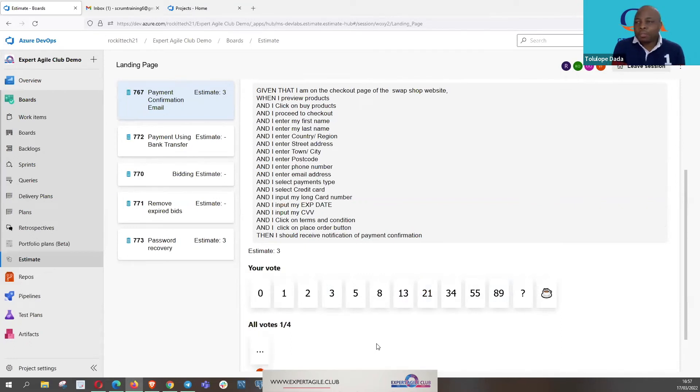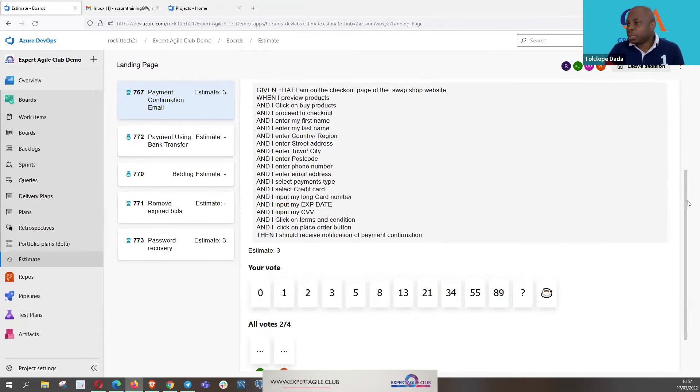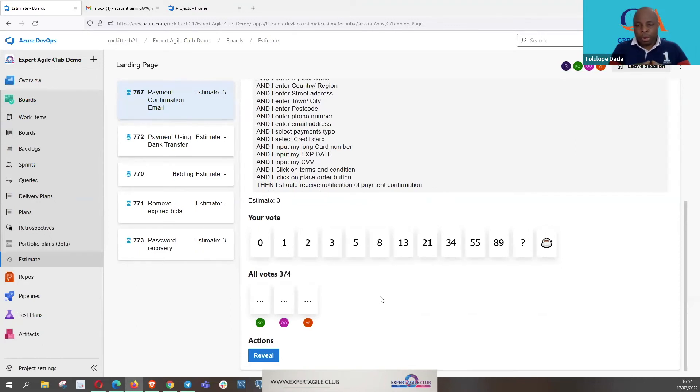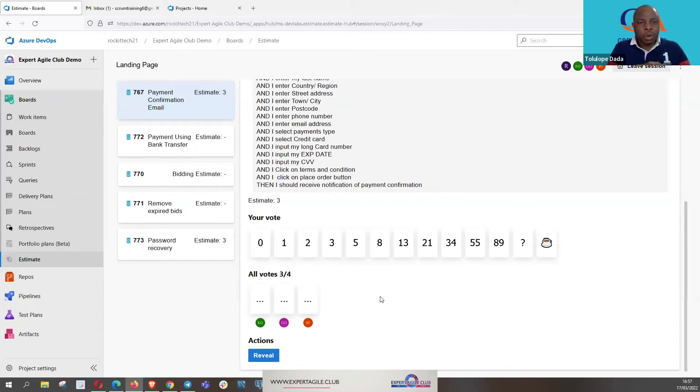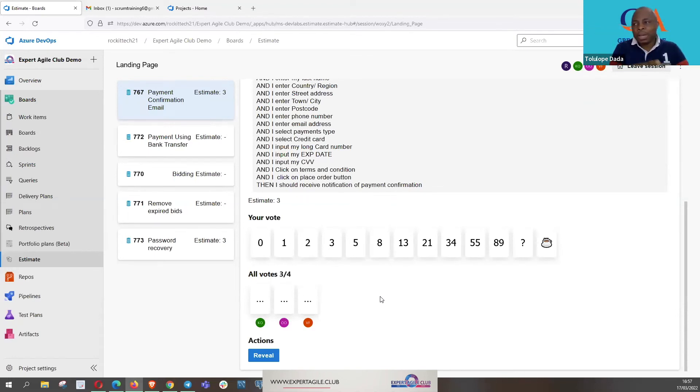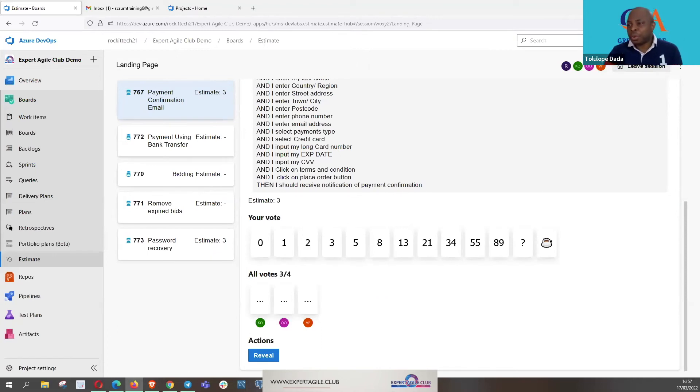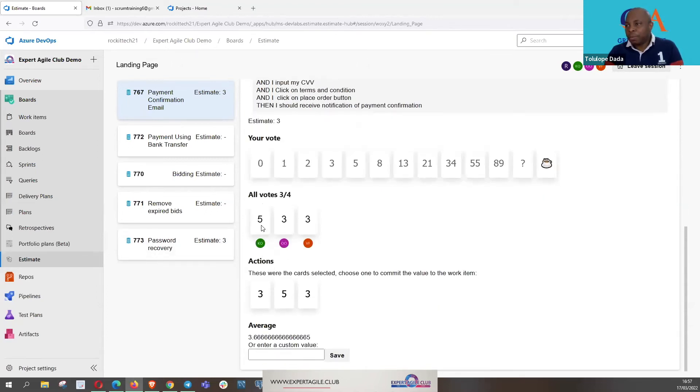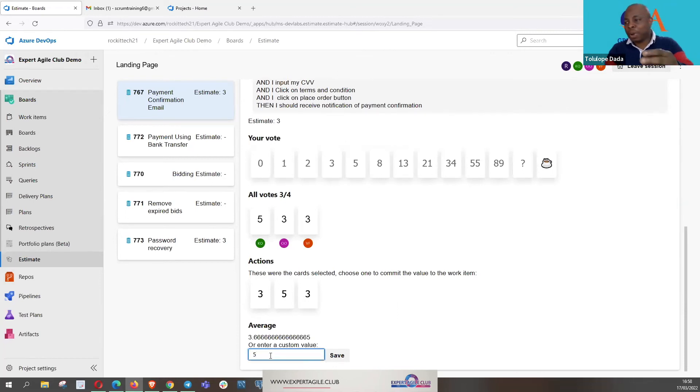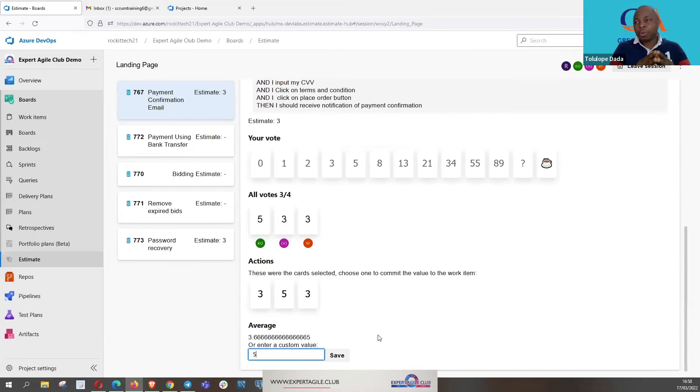You can see again, votes are not shown, they are unanimous, so that we don't want anybody to be influenced by anybody. We are seeing in some teams when the lead QA or the lead developer vote, every other developer tends to follow the vote of the lead when we are in the physical meeting. To avoid that, the votes are not shown. Everybody votes unanimously and then we all reveal the vote afterwards. It's going to reveal now. And then, like again, we have 5, 3, 3. My people really like five and three, which is good.